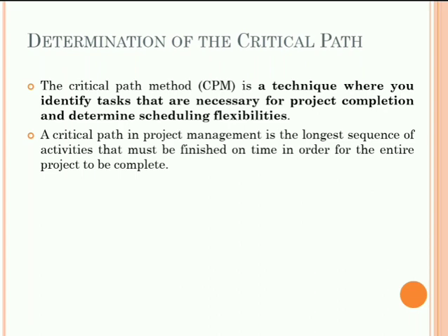For example, let's say a marketing team is producing a new interactive blog post. Some of the tasks that might be in the work breakdown structure are as follows. The first task, let us say task ID A, is creating the outline. Duration of the task, let us say 1 day. Next, consider the second task, task ID B. We will write the draft for that particular blog. It will need 5 days of duration.